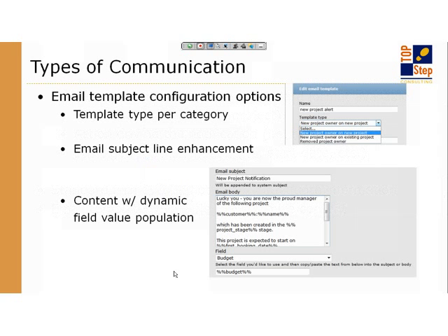And the reason, you may ask, why am I giving them first booking date? I've been managing the proposal or the pipeline activity with a forecast of resource needs. So I'm sort of pre-populating the resource schedule for the person who's going to take ownership of it.